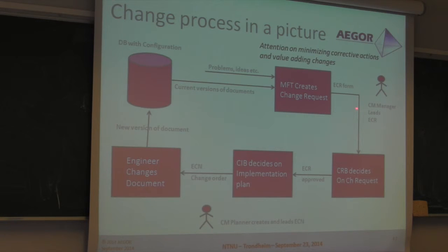If you take the fast track, you have a very simple process. Everything is done by the author and an assigned user or one of the important users. So you go slow, but it's the same process, and it's still under responsibility. So it's a delegated task under responsibility of the board.